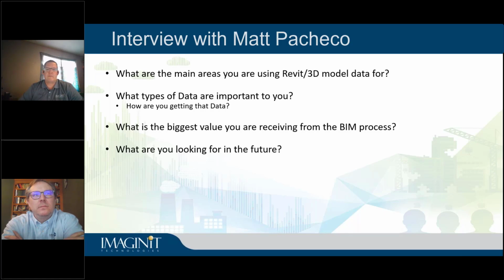We are actually. Our BIMs are living BIMs, and so they're constantly in flux. There's things being deleted and added based on project designs and so forth. And so we have AE partners that not only generate and create the BIMs initially for design and then provide the record models, but based on our workflow, we also have a check-in, check-out process for project models that then get updated based on the project scope of work. And then we have a process for how those updates get back into our living central model. So we are managing and maintaining the BIMs at this point, and we're still learning how that effort comes together.